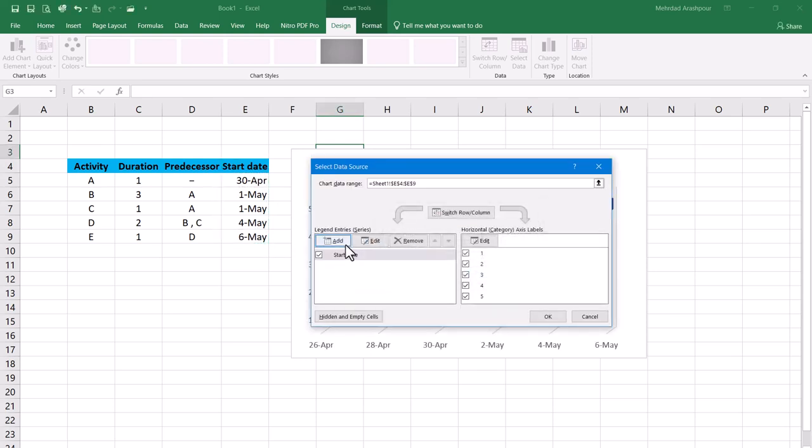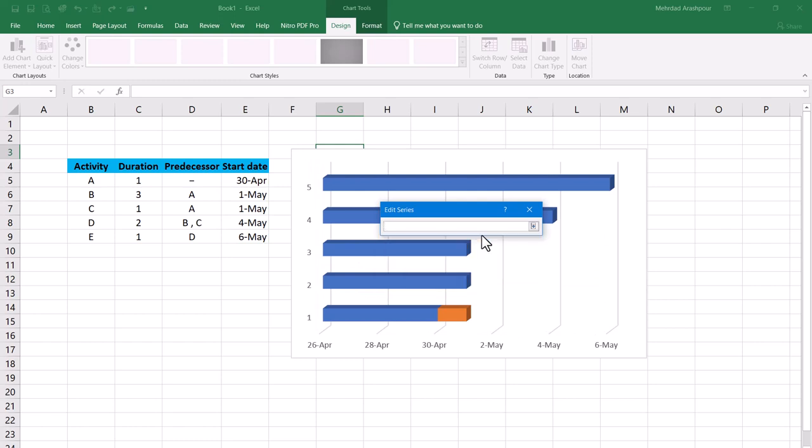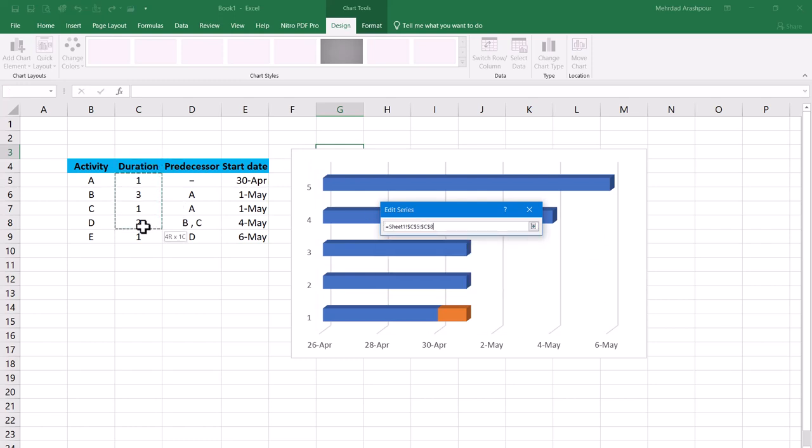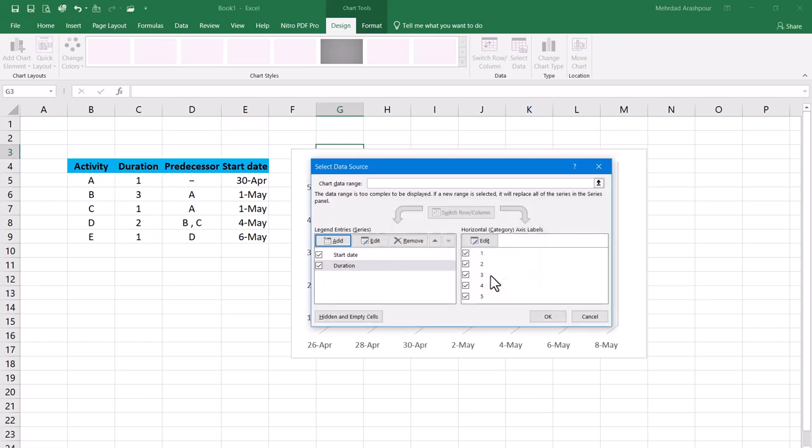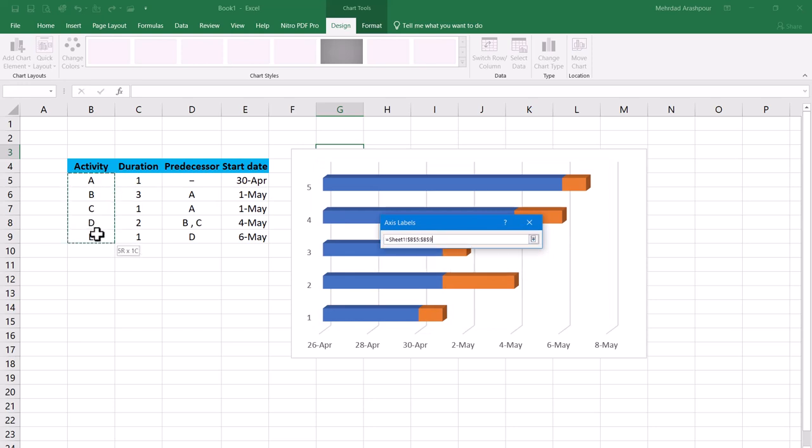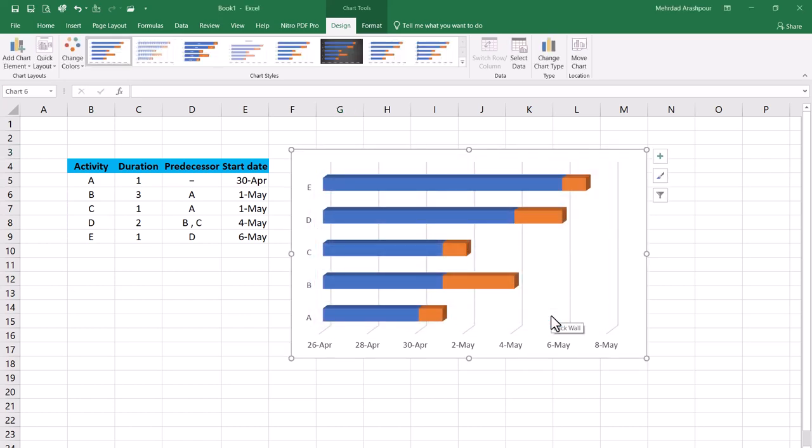After that our second series is added. For its name we choose Duration and for the values 5 activity durations. Our final task here is to edit axis labels which should appear as activity names. For the axis label range we choose our activities A to E. This concludes the second step in creating our project Gantt chart in Excel.